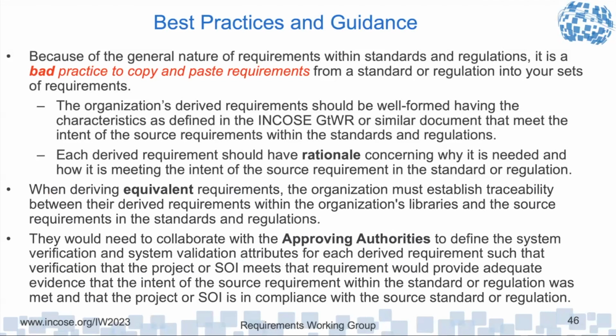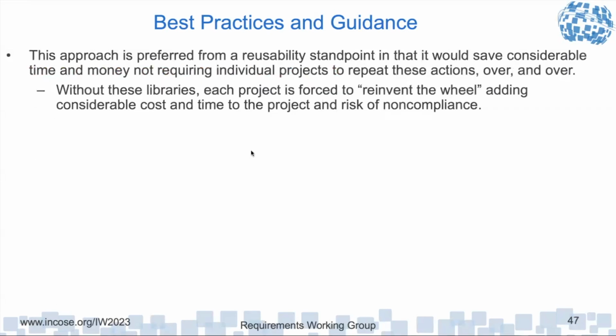If so, then that equivalency thing kicks in. And this approach is preferred from a reusability standpoint in that it would save considerable time and money, not requiring individual products to repeat the actions over and over again. If you don't develop the libraries like this, each project is forced to reinvent the wheel, adding considerable cost and time to the project, as well as that risk of non-compliance.